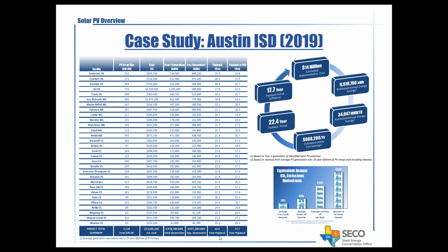But again, this is based on 2018 data from a study conducted in 2019, and the price of solar has gone down. According to the National Renewable Energy Laboratory, in 2018 it was about $1.83 per watt DC for a commercial size system, anything between 10 kilowatts to 2 megawatts. For example, in 2020, the same report said it would be about $1.74 per watt DC, and then more recently in 2021, it's come down to $1.56 per watt DC.